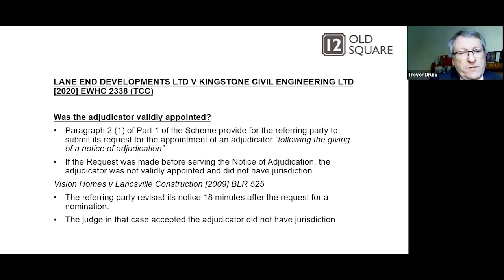So there's reference to Vision Homes and Lanksville Construction, where the referring party in that particular case revised its notice 18 minutes after the request for a nomination. The judge in that case accepted the adjudicator did not have jurisdiction. So even 18 minutes later, that wasn't good enough.